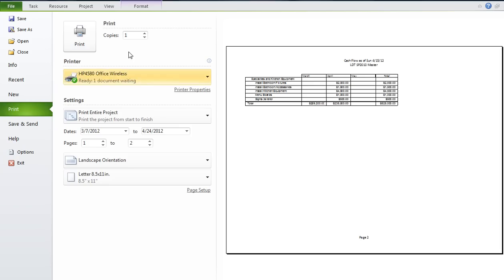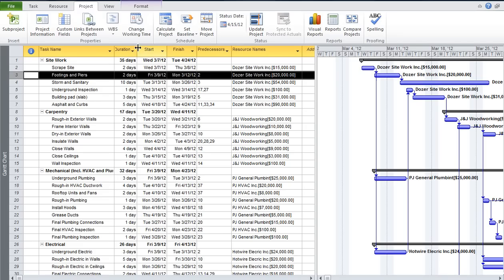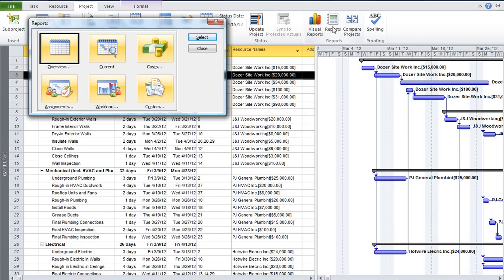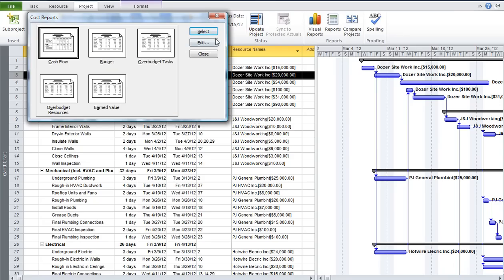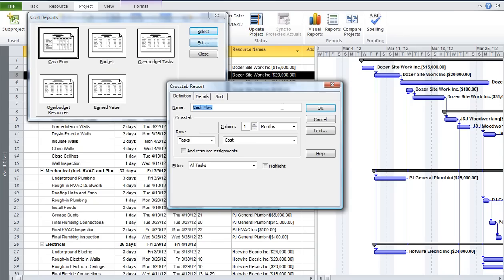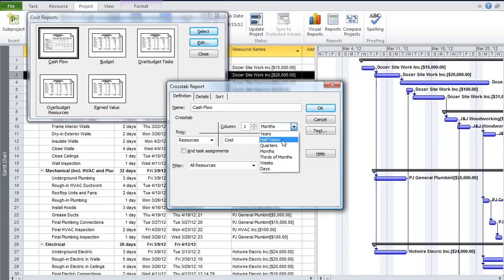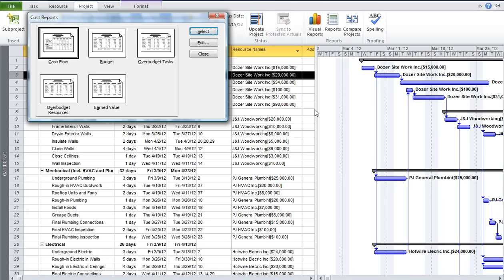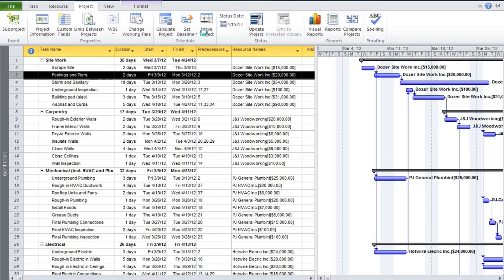Now if we don't want it to go to two pages, back on the report we could have set it to show summary tasks rather than every task. So let's go to Costs again, select, and edit our cash flow. This time let's run it by resources and for the whole year, so we can see how much money will be going to each of our subcontractors. Click OK and then select the report to run under our new parameters.